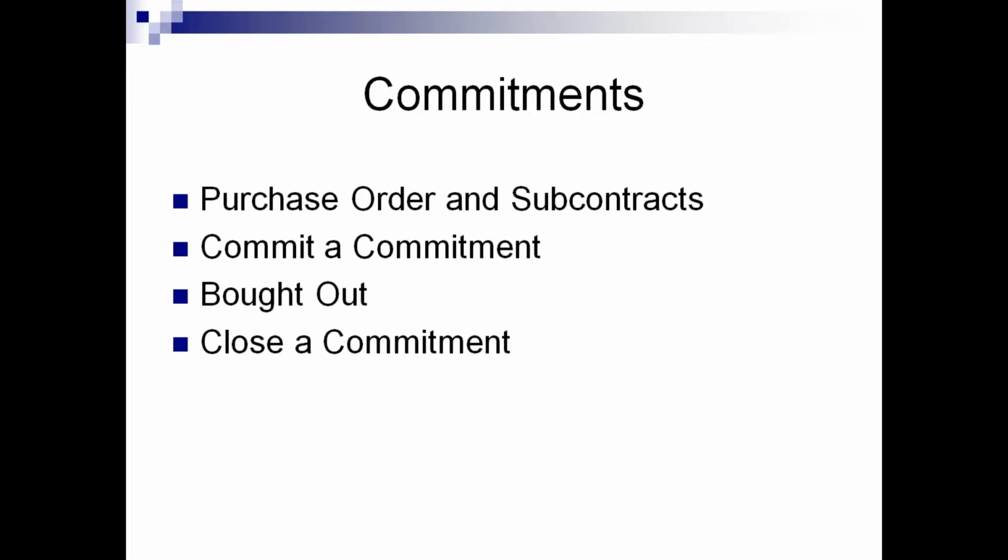Now, if you're wanting to track this with reports inside project management, you need to do it there, not inside job cost, because inside project management, it will create document records for you so that you'll be able to look at the inquiries and the commitment reports through project management and get that information. If you do it on the job cost side, it's only creating records inside job cost. It's not creating them over in the document file within project management.